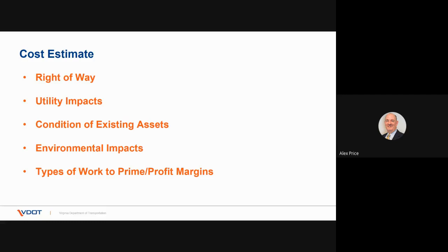So if we assume we don't have a need for right-of-way or easements, we need to be 110% sure. There's almost always a need for at least an easement. And we've made this mistake before, and these costs can certainly blow a budget really quick. So just keep in mind when you're making those assumptions, we need to be confident in the assumptions that we're making.